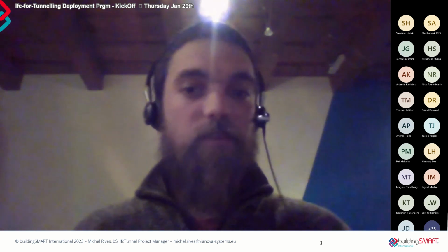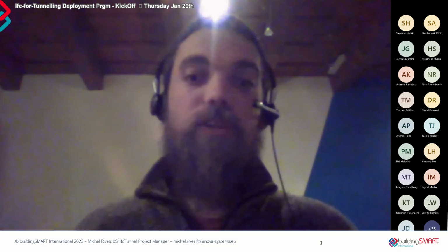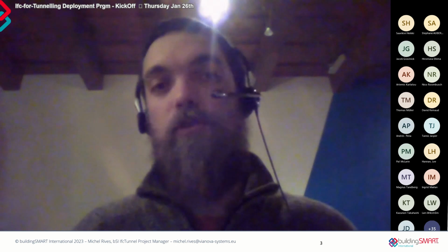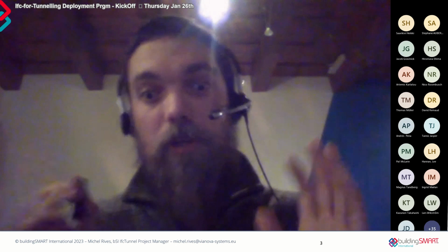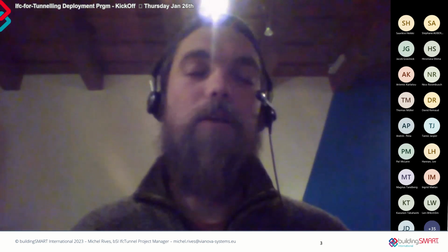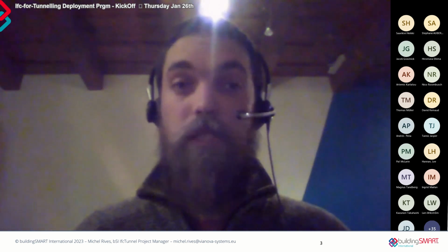And as intended, on the Monday before the sprint closure, it is intended that everyone submits a file so that we still have 3 days to pinpoint if there are some mistakes, to pinpoint if there's some stuff that is not right, or perhaps also our checking procedure will crash. Hopefully not, but it may happen as well. So that we'll still have some time to prepare for the kickoff on Thursday. And I would really be grateful if we see a lot of files submitted even before that deadline.